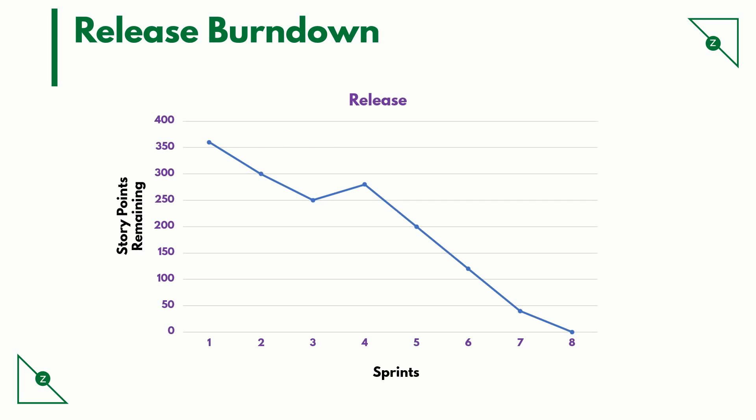A typical consumer of a release burndown is a release manager or program manager — people who are more concerned about the features being committed to the release and the customer. The curve of a release burndown chart can be interpreted similarly to that of a sprint burndown chart.